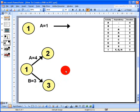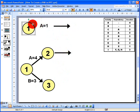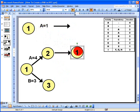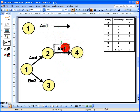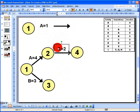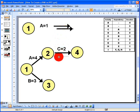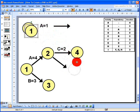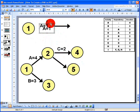Next is activity C. I copy and paste an arrow, add an end node labelled node number 4, then copy and paste the text label — activity C has a duration of 2 days. Activity D is similar to C in that it can only start when activity A is complete, so its arrow begins at node number 2 and points downwards. I add end node number 5 and label it activity D with a duration of 5 days.